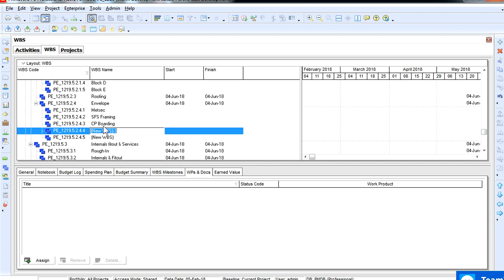For the scaffolding, you could just say it's a duration of when the roofing gets up, then you erect the scaffolding from ground floor all the way up to the 17th floor. Because they're hanging windows, you can hang the windows from outside, but you will still need to come outside to make good and fix on the EPDM. So these activities in this WBS cannot start until the scaffolding's been erected. Okay, so the CP boarding, and then we hang the windows.